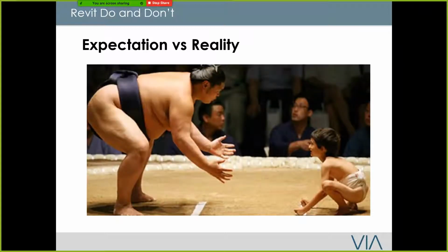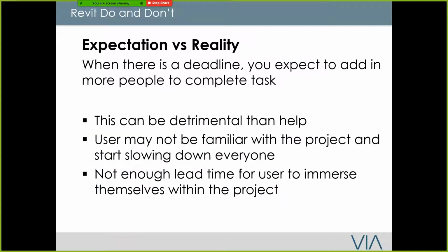All right, expectation versus reality. What ends up happening in most cases is that whenever there's a deadline, you expect to add more people just to complete a task. That's what happens in pretty much every Revit project. Most often, I find this can be very detrimental. A user may not be familiar with the project and starts asking questions, and sometimes the people already working on it may not have time to train the person.